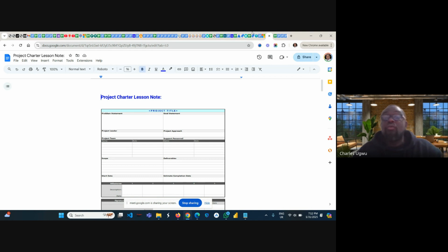But if you want to capture it, issue a change request form to the stakeholder. They fill the change request form. That is the process of adding something. The change request form is going to clearly state the reason why they want to add something to the original project that is going on, the implication, the cost, the time it is going to take, the impact.